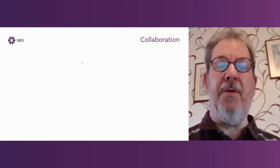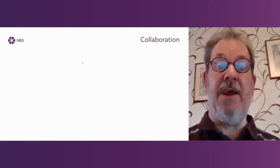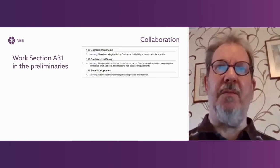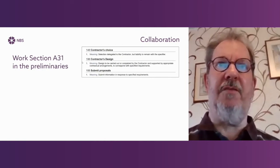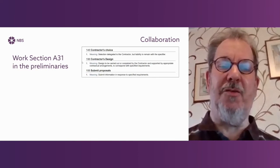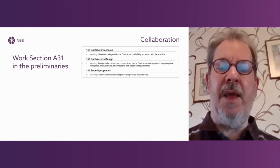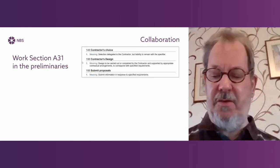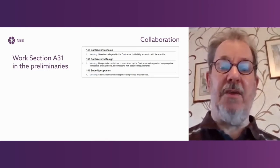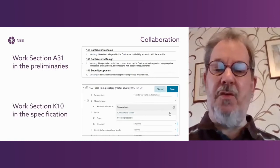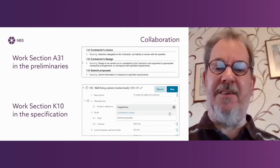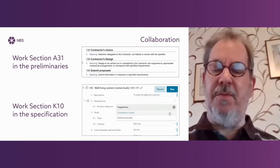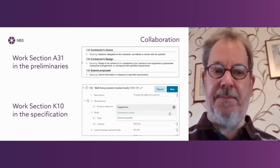But the important thing with all of this is collaboration. There are some things which appear in the prelims which directly affect things which happen in the work sections. In this example, we have some definitions of what is meant by various terms which are used in the work sections. They're contained within the preliminaries, but they're used in the work sections. So contractors choice, contractors design, submit proposals are shown up in the work sections, but the definitions are in the preliminaries.